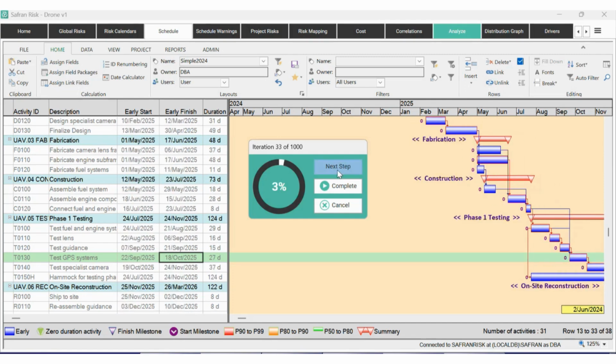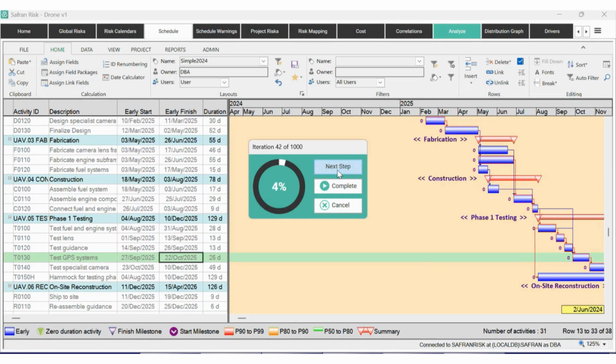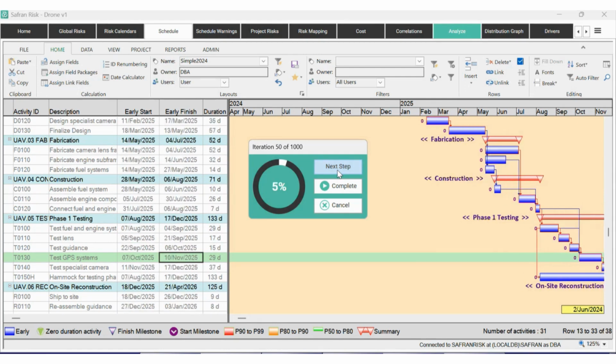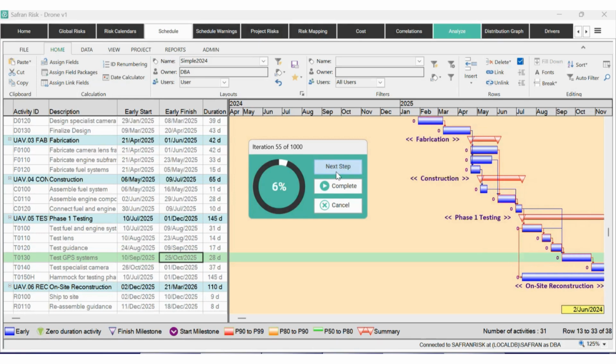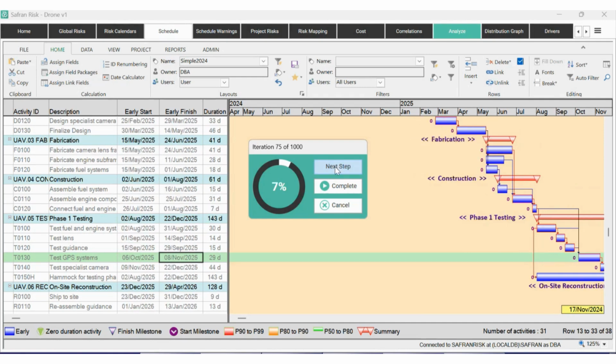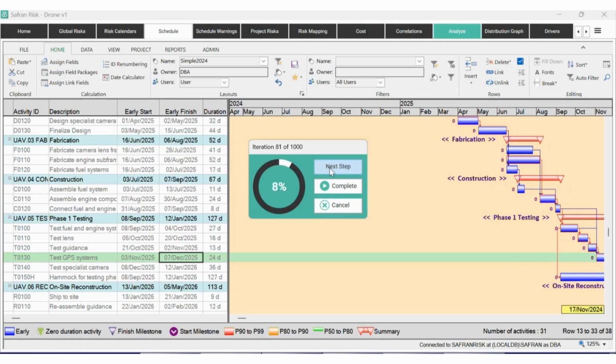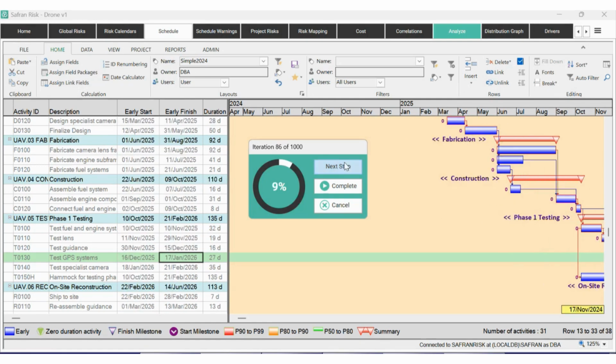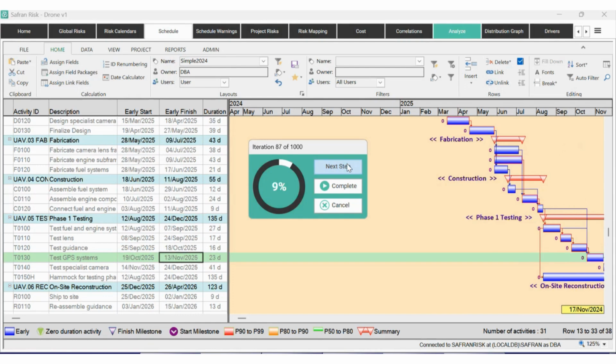So although sometimes the activities are taking place in October, November, they're also taking place in August, they're also taking place in January, etc. So depending on what's happened beforehand, the time period where we're actually seeing these activities occurring is itself a moving target. And so simply adding on a certain amount of time according to when we thought the activities were going to take place is potentially quite a dangerous way of doing things, because if those activities take place a lot later, maybe we've had some kind of delays to the project and the activities have been pushed out, then what we could potentially be doing is adding on unnecessary time that we didn't need to.